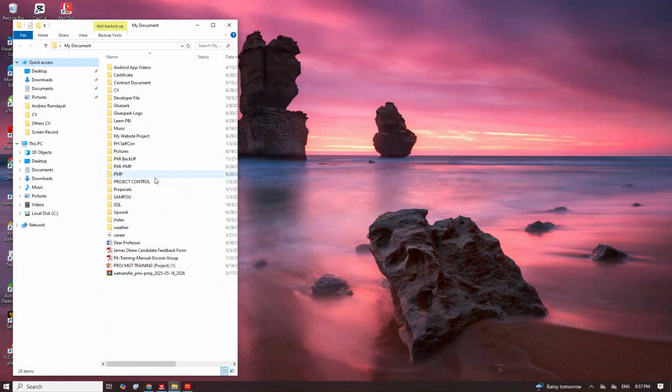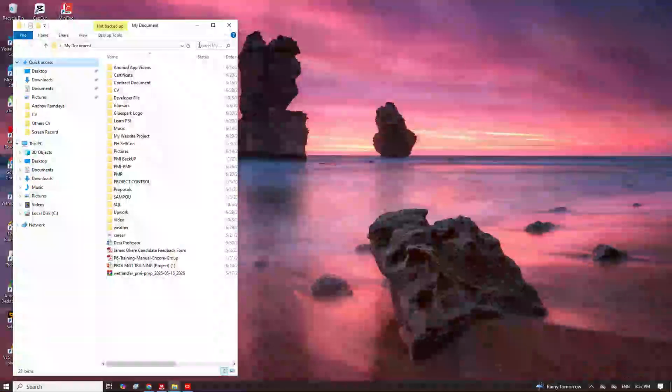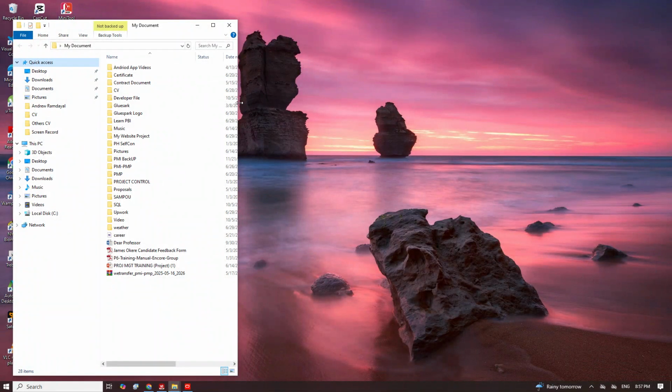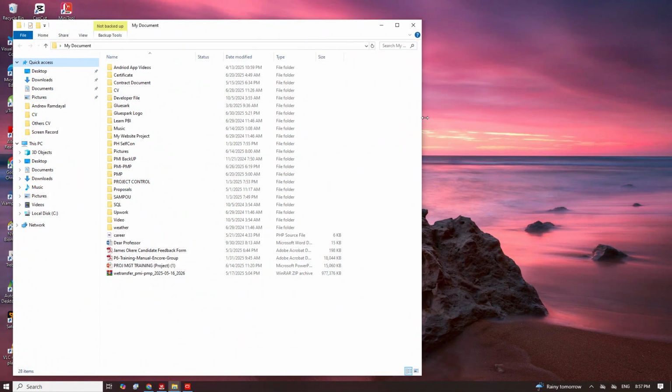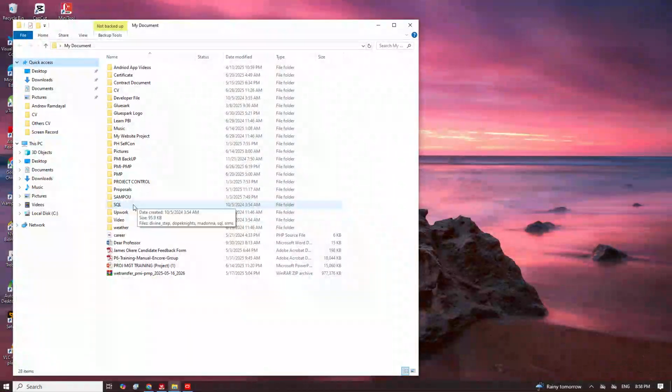Also remember, as I said, for fabrication, there's what we call productivity, or a norm list that contains how long it takes them to weld a certain number of inches of pipe and all the rest. Those of us who are familiar with fabrication know what I'm talking about, right? They have it as a Bible that covers what they do, and also use it to do their estimation. We call it estimating resources. Use it to estimate resources and duration. Okay, so other than that, how to create it continues.